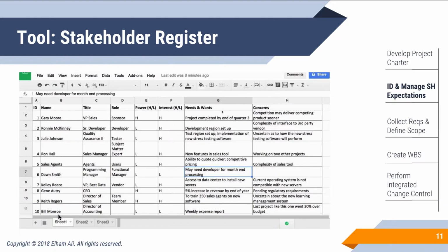In the matrix, what I would always have is the stakeholders' role, their contact information, categorizing them as internal or external, their interest, influence or power, expectations, and also communication requirements. There's a column that I would also put, especially for high-level risky projects: a contingency plan on how to manage different scenarios of stakeholders. I'll get into that more at the end when managing scope creep, because this becomes extremely important.